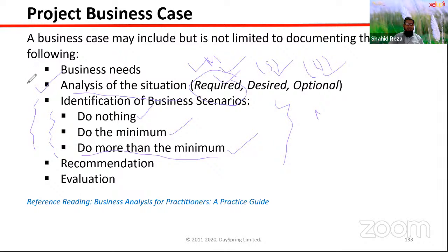And finally, not only the analysis or exploring part will be there, you also have to recommend. You have to give a recommendation based on this NPV, this IRR, and these will be the values, these will be the benefits. That's why we need to do the project. So that recommendation you have to have, as you are the experts who are dealing with the business case.